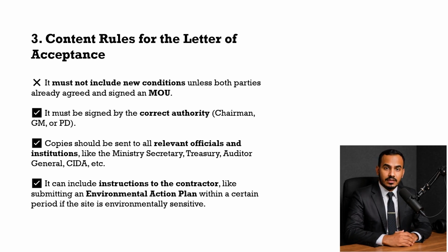Now, let's look at the basic content rules for the LOA. Rule number 1, the LOA must not include any new conditions, unless both parties have agreed, and it's supported by a signed MOU. Rule number 2, it must be signed by the proper authority, like the General Manager, the Project Director, or the Chairman. Rule number 3, copies of the LOA should be sent to all relevant authorities, such as the Ministry, Auditor General, and the Treasury.